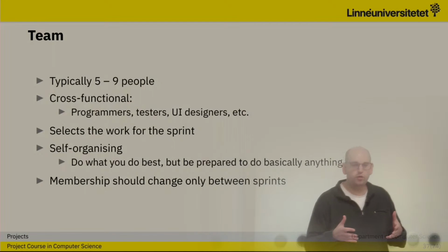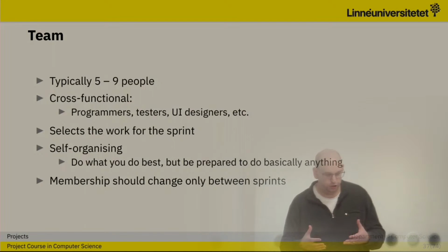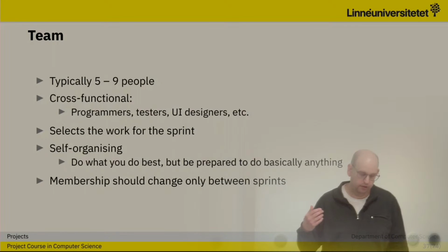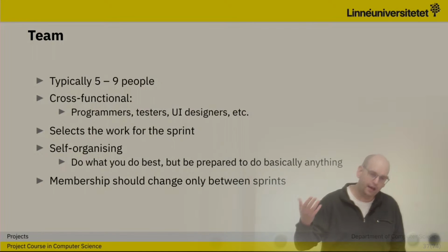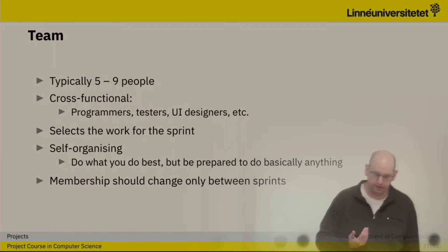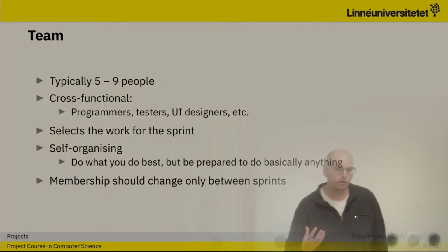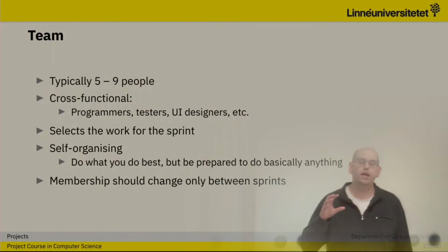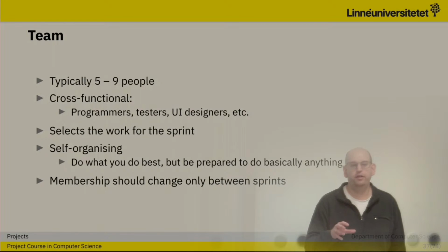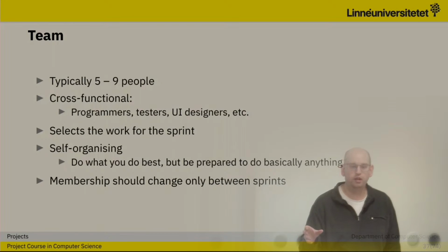However, when we create these teams, they should be cross-functional, meaning that we should have programmers, testers, UX designers and so on, and everyone should have a working knowledge on all the different things. And this is important because we want to create teams where we are not relying on a single person for a specific task.